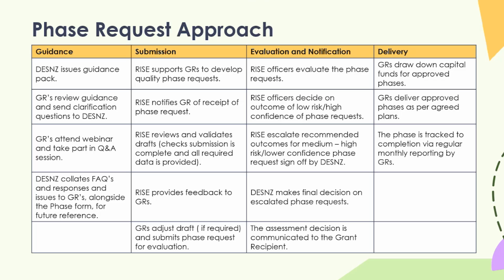You'll submit that phase request once you've done a good number of retrofit assessments, hopefully 100%, but it doesn't necessarily have to be 100% of those KPI 1 and 2. That's principally retrofit assessments, at least a level design, enough to understand what the costs are going to be, what the measures are going to be, what the starting and finishing EPCs are going to be, and then a tenancy sign-up, so that the tenants are aware of the works and not going to refuse those later down the line.